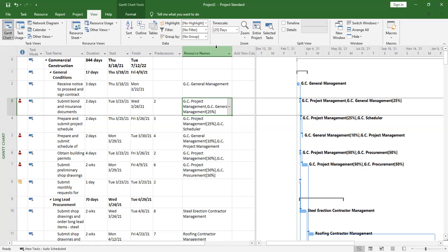Then overexertion of resources will happen if on a single resource you are assigning a lot of tasks that it can't handle. That's when we experience overexertion of resources. So when you do resource leveling, it gets rid of underutilization and overexertion of resources. Sometimes it is referred to as resource smoothing or smoothing. That's how different books and literature call it. So if you come across resource smoothing or smoothing, it is the same as resource leveling.